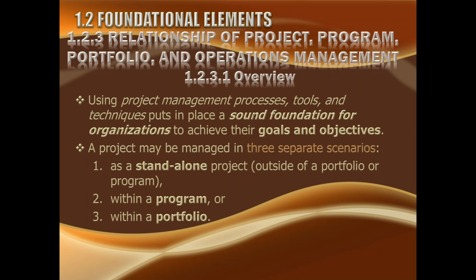So a project could be a standalone project which could directly be answerable to the organization, or it could be part of a program. A program is made up of a number of projects. But as I said, a project could exist alone. A standalone project could also exist, which is not part of any program. But in that case, the product of the project will be handed over to the organization, and the responsibility of realizing the benefit or outcome out of it would be the organization's. The project will not be responsible for that.